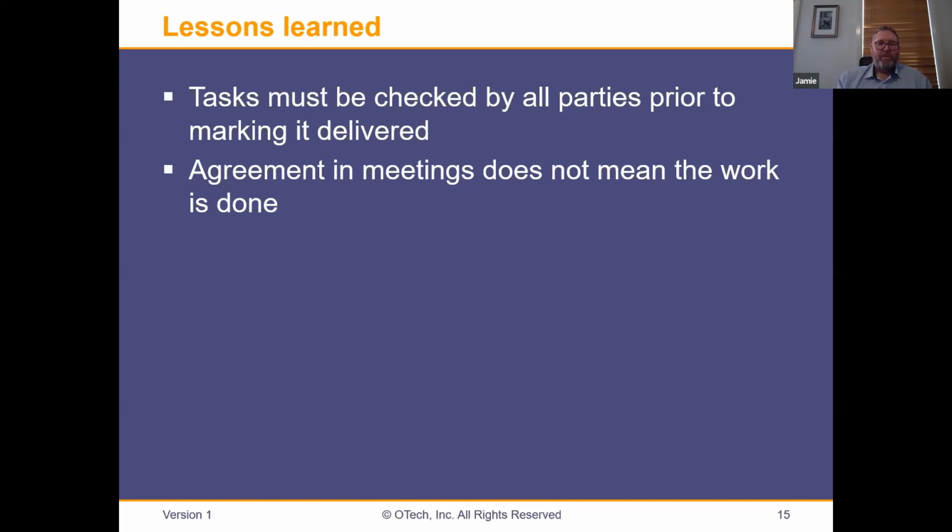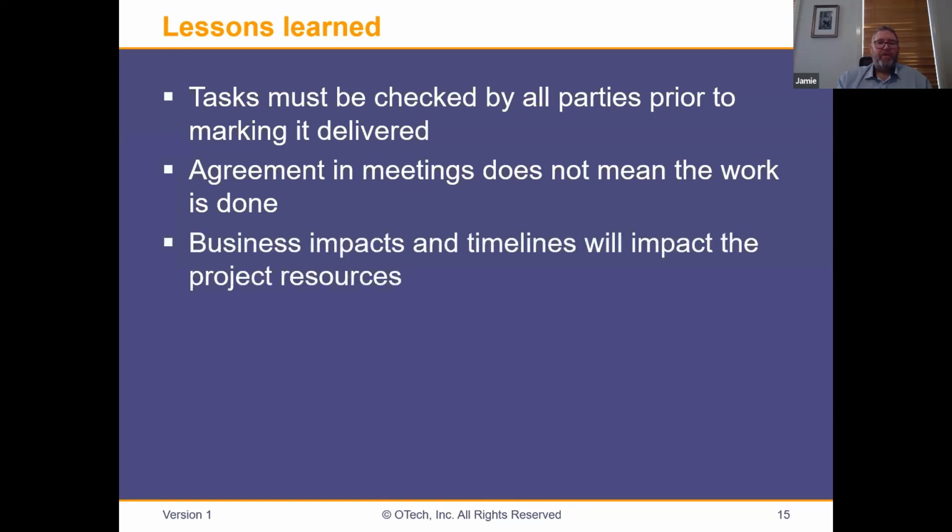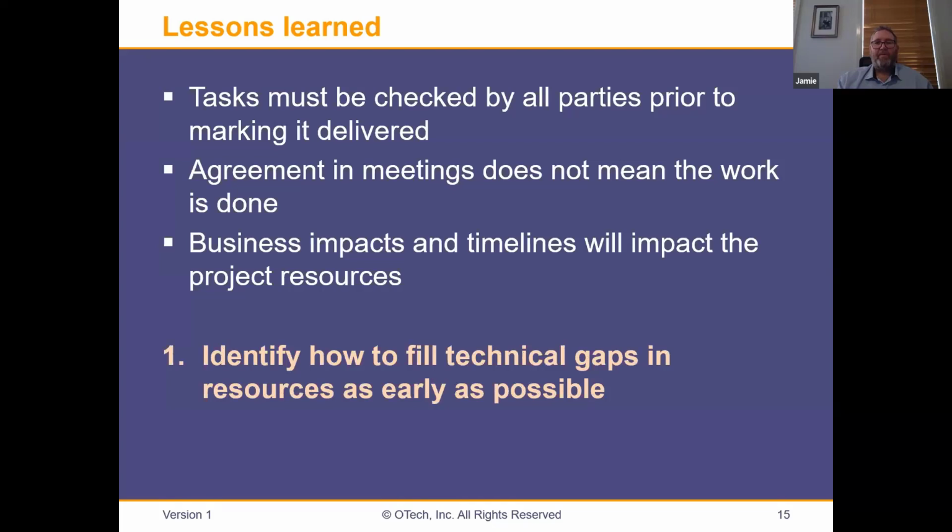And in the end, it was very, very evident that they didn't have the skill set to do that. The other thing was the business impacts and the timeline on the project resources. When you do these projects with small sites and in particular medical imaging, the idea is we can just continue doing our clinical work. We can just keep taking x-rays. We can still make the money coming through the door from a radiology business perspective. The simple fact is change is hard. You need to allocate resources. So if you change that diamond, if you change that triangle, you're going to end up with issues.